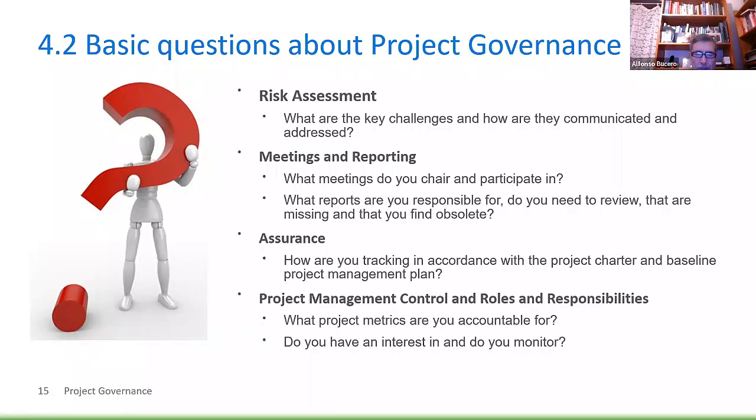Asking these questions was enabling me to form the baseline governance framework. So I was able to understand what the level of stakeholder engagement and communication was, which was the foundation for other governance components. And after refining the governance framework, I was challenged to execute. So I devised a meeting structure and a communication plan that depicted the flow of information up to the project sponsor and determined the frequency of information flow, the content of the reports and meetings structure, and that were aligned with the stakeholder expectations and with their engagement.